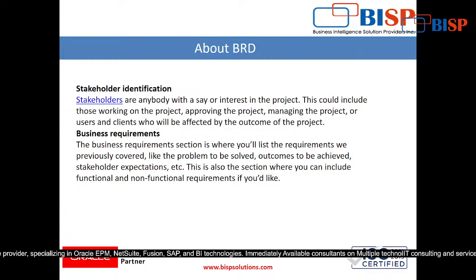And when we create our BRD, we have to take the sign off from them that this is the BRD, what you are using, what we are providing you. After the implementation, how your business is going to work, everything is defined in this. Now please approve it. Once they approve it, only then will we be able to start the project implementation, right? Then the stakeholder identification is done.